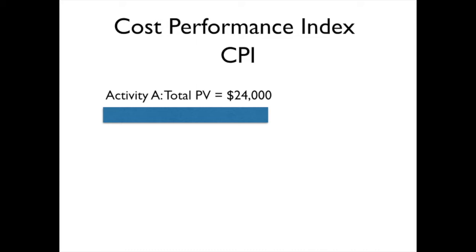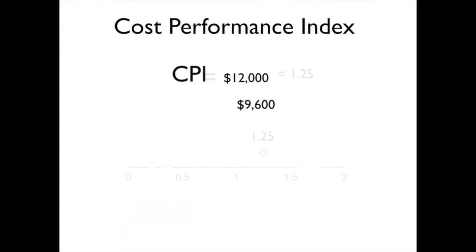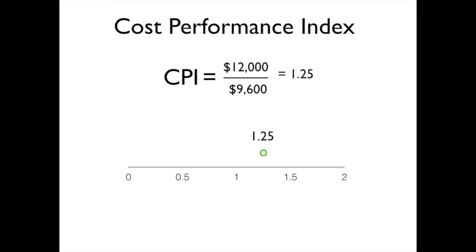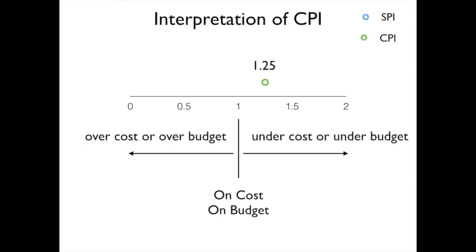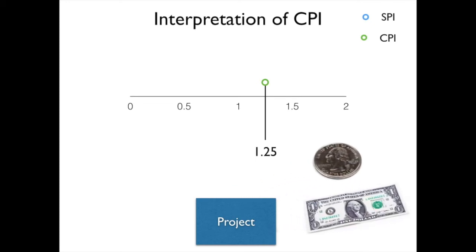Let's look at another example. We have activity A with a total plan value of $24,000 again. We are 50% complete with this particular activity, so our earned value is $12,000. But when we go talk to our friendly accountant, he tells us that our actual costs are $9,600. When we take EV and divide it by AC, we get $1.25. This indicates that our project is under cost or under budget. Another way to interpret this number is to say that for every dollar that we put into our project, we are actually getting $1.25 out.